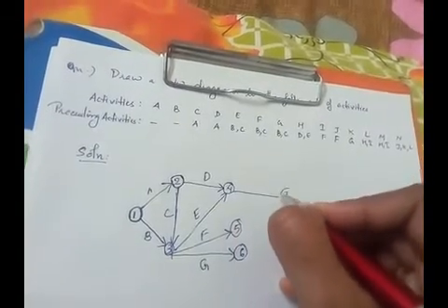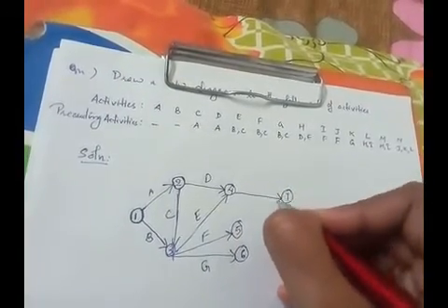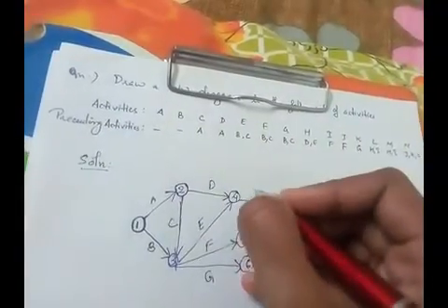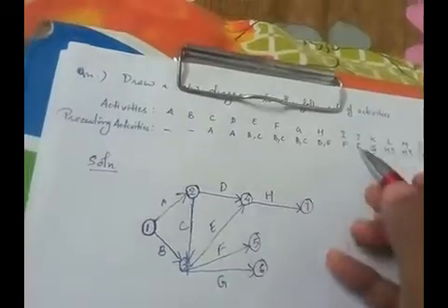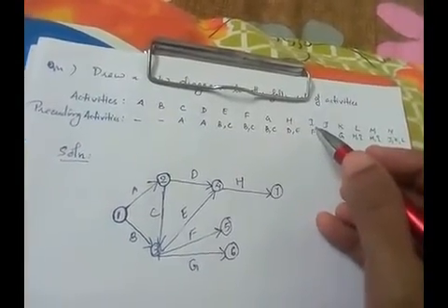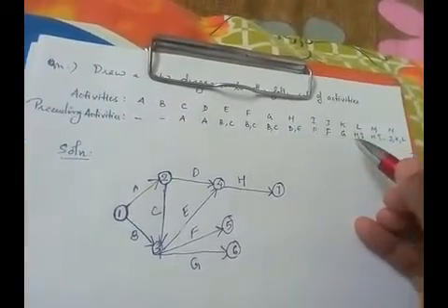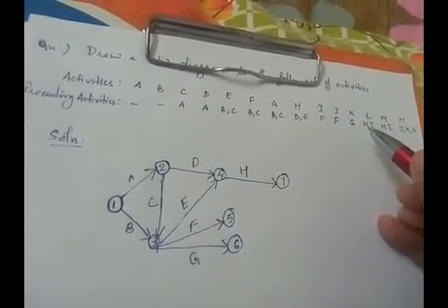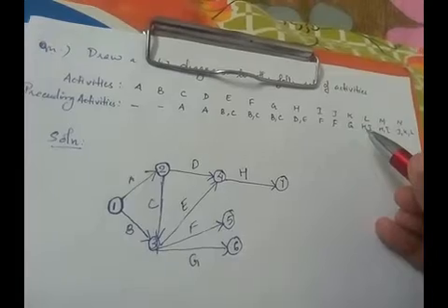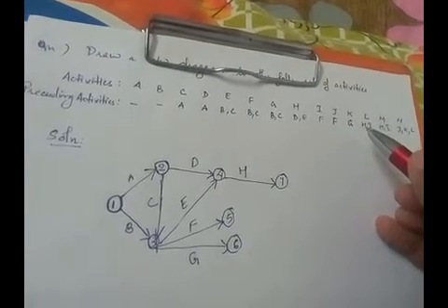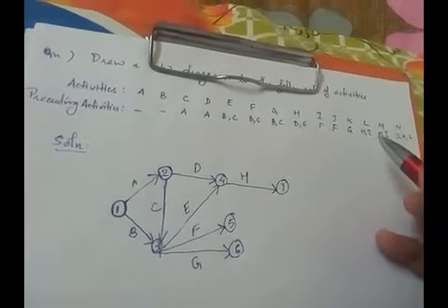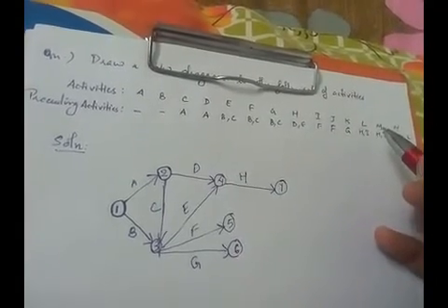The next number we can give is 7, since till 6 we have already labeled. Now this is H. Now we are going to draw I. In the case of I, in the preceding activity list, we can see that I is combined with H. And after completing H and I, there are 2 activities emerging from the event where H and I end, right?